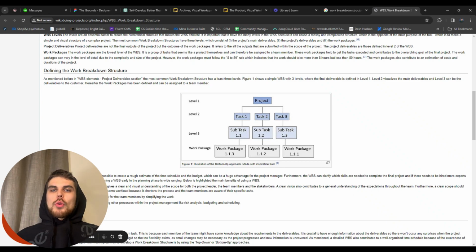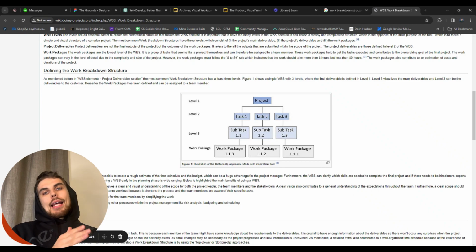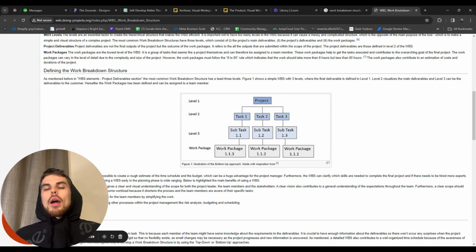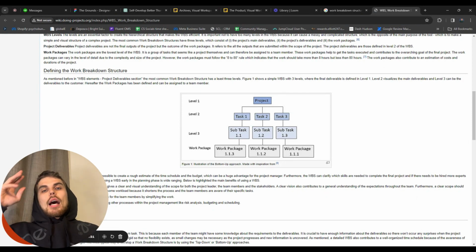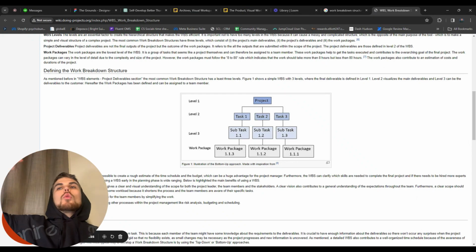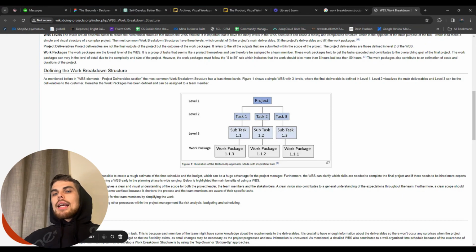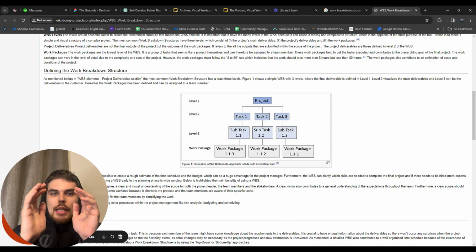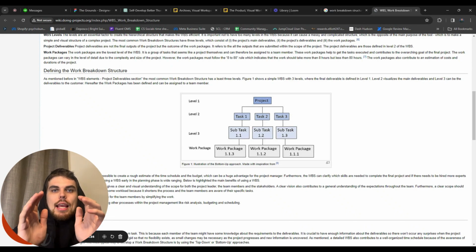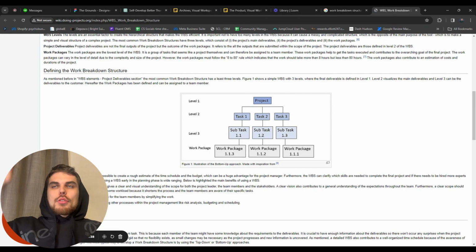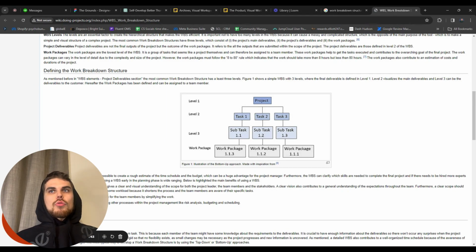Now, why do we want to do that? First off, it's going to be a lot easier to divide the tasks amongst your team, right? People on your team might not be the brightest, and giving them tasks like, oh, take care of the front end, that's too much work for them. They cannot process that. You've got to be like, I want you to make the timer, and then I want you to make these cameras. Having all these work packages laid out, where the person on your team is just going to be able to tick them off one by one, is going to be super useful.